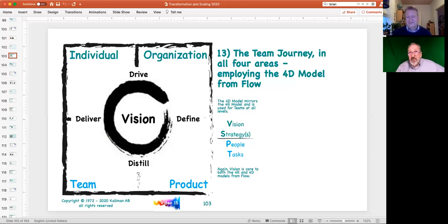And as recently as just a couple or three years ago, I've had teams commit to, I understand the data is going to change. The first time it happens, we can't do that because I'll have to change all of the code. So it's important to spend time on that definition phase because you drive out misunderstandings, you drive out assumptions, and if you get it documented, then everyone can share the same vision of how a particular concept is implemented and used and what it means, and everything just moves faster.